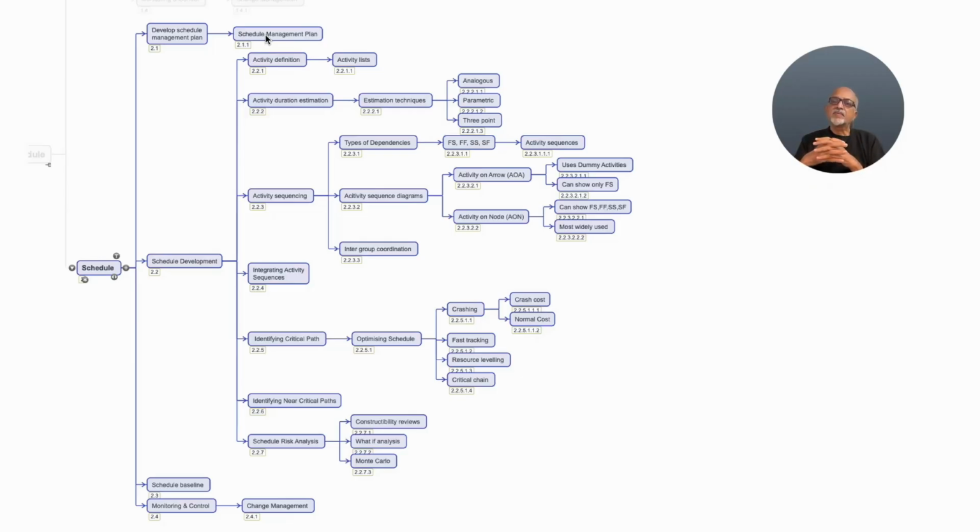So we need to standardize. Who will create the schedule? Which tool to be used? Who will approve the schedules? What are all the integration points across these schedules? Who will update the status information or progress information to the schedule? What will be the frequency of it? What will be the unit of measure of progress? All these must be defined. Otherwise, it'll become impossible to come out with the integrated project schedule.